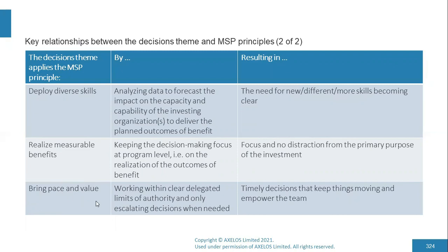And this principle will ensure in the decisions theme that working within clear delegated limits of authority and only escalating decisions when needed. Because one of the concepts of this principle of bringing pace and value is to allow people at a certain level to make decisions instead of having to take it up at the higher level. Therefore, having the limits of authority and delegated limits should be established as part of the decisions theme.